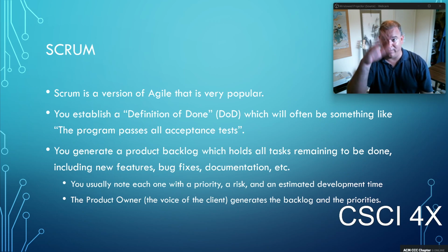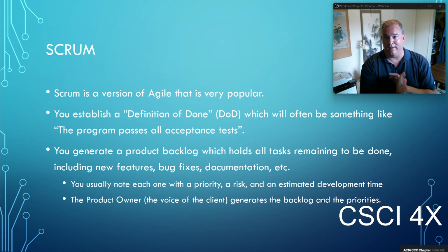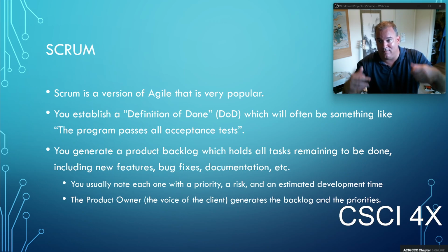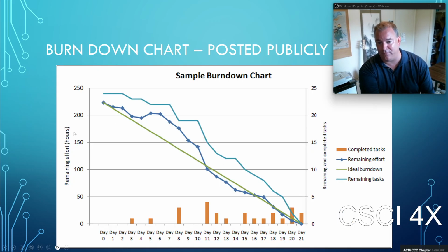And then you're going to have to throw onto the backlog, like, okay, we're going to have to pay money now to NOAA. Their whole database is different now. So we're going to have to rewrite that whole thing, and so sometimes the amount of work you have goes up. It'll look like this sometimes. So if you look at day 4 and 5 here, you can see the amount of work you have remaining goes up. And it happens sometimes. Like you discover that there's something you didn't know, or something changes, or something broke. You throw more work onto the backlog.